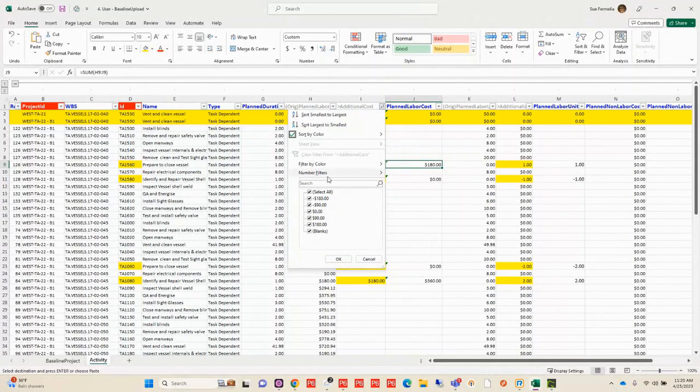Okay, it's finished. So I can go out and refresh it again, and I can see where I have my new activity. See, I have added it here. And then I also have my debits and my credits, where I can see my variance on my units as well as my costs. So those came through and everything's looking good now. A lot easier than trying to use either that functionality in P6 to change the baseline or having to detach that baseline and restore it.